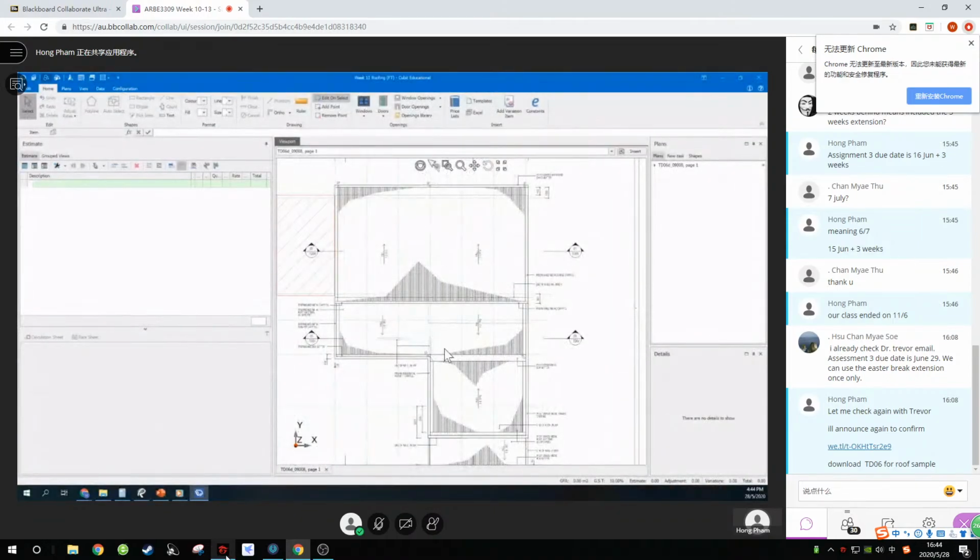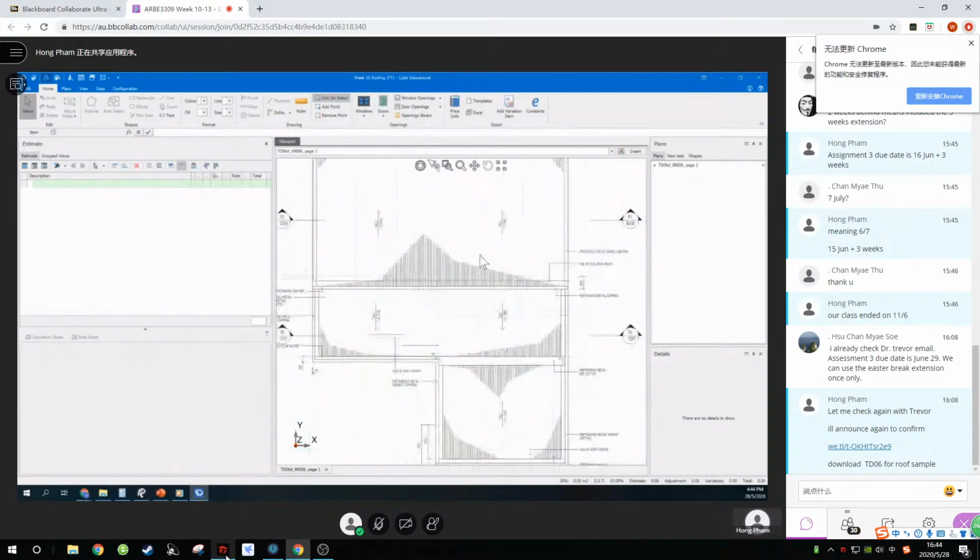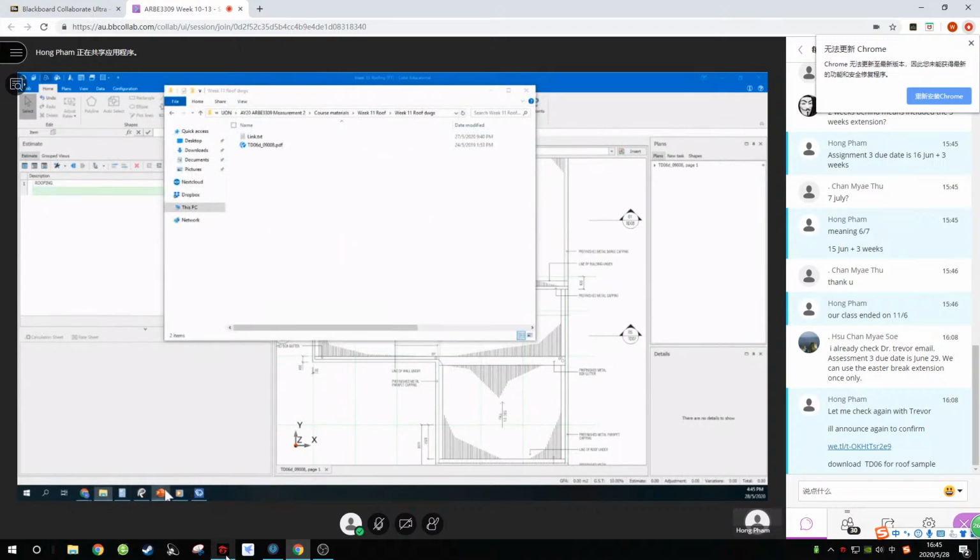Can you see that the roof has 2 degree, 1 degree, 2 degree, and 7.5 degree? So what I'm going to do is I will have 3 items for this, 3 items for 3 roofs. I'm going to separate them out into different ones. First I will start with roofing sections. Second I'm going to do the preambles. Remember preambles? I'm going to follow your preambles here.